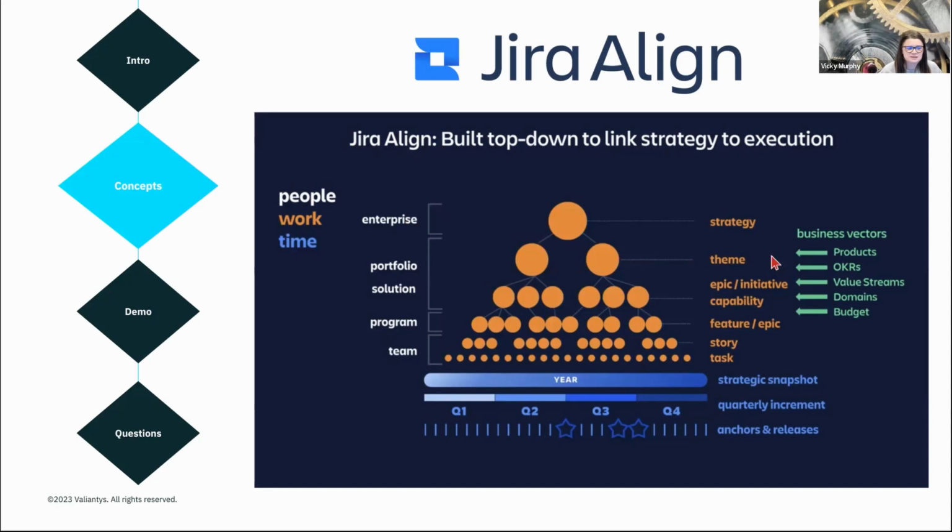If you're familiar with the SAFe framework, they really represent that high-level strategy that might take a year, maybe a little bit more to complete. And we can decompose that into our portfolio epics or initiatives that might take 1 or more quarters or PIs to complete, and maybe even further into capabilities if we are needing them. We then come down to what we call the program layer, and this is really that team of teams layer. This is where we are executing on our features, and we are trying to complete those features by one team of teams in one program increment.